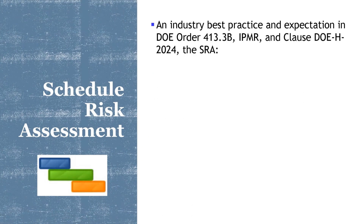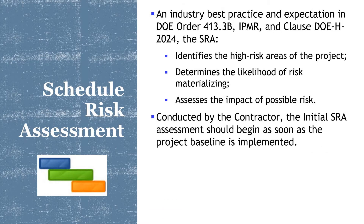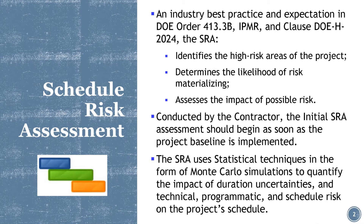A Schedule Risk Assessment, or SRA, is an analysis tool which uses the integrated master schedule to identify the high-risk areas of the project, determine the likelihood of risks materializing, and then assessing the impact of each possible risk. While an SRA is an industry best practice, it is also a requirement of the Integrated Project Management Report, or IPMR, which is cited in DOE Order 413.3b and in the Corporate Clause DOE-H-2024 when EVMS is required. The initial SRA should begin as soon as the project baseline is implemented.